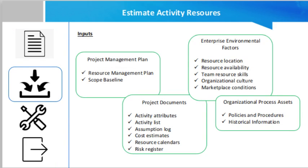Now if we talk about the inputs for this process, the first input is the project management plan, which includes the resource management plan. The resource management plan defines the approach to identify the different resources needed for the project. It also defines the methods to quantify the resources needed for each activity and aggregate this information.